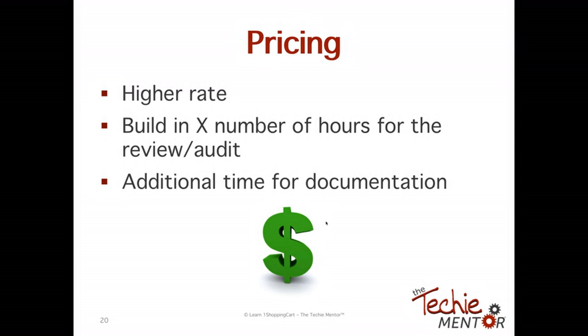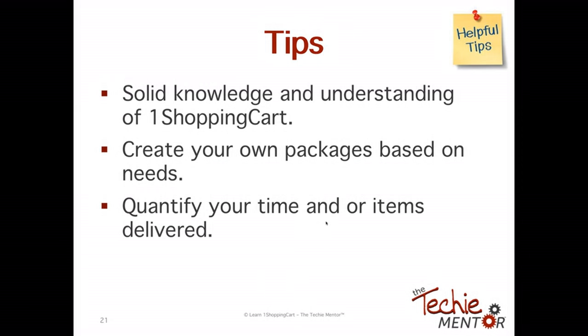You have to build in the number of hours for the review and audit. I said 3 hours. That is also the time for the documents. So the audit time includes me looking at their system, figuring out what the problem is, coming up with alternatives on how to fix it, as well as making any documentation or action items that I would have. So this one's great for solid knowledge and understanding. You can create your package based on customer needs, and you have to quantify time and or items delivered.